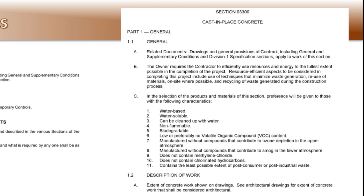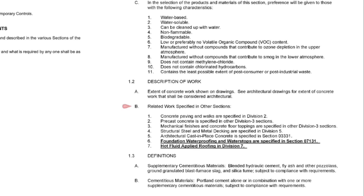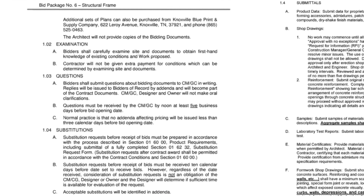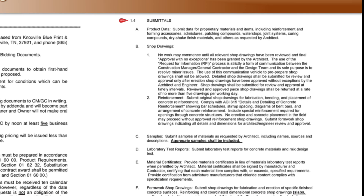Go ahead and try to estimate the cost of doing that one statement. There is also another area of related work specified in other sections, listing seven different other sections to review. At 1.3 definitions, they give the definition for supplementary cementitious materials and cementitious materials. Note that bidders are to carefully examine the site and documents to obtain first-hand knowledge of existing conditions — this relieves the owner of responsibility for existing conditions that could have been observed by visiting the site. Substitutions are outlined and will be identified in an addendum to all bidders. Submittals and shop drawing requirements shall be submitted to the architect, and no work may commence until approved by the architect.